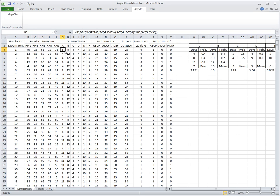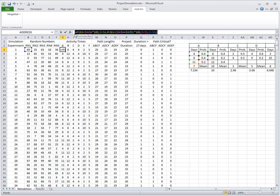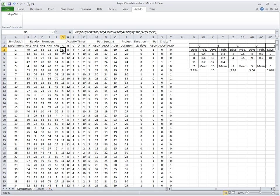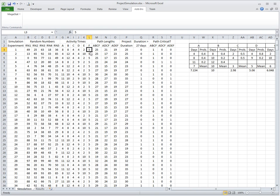Project activity times are computed through mapping. There is a certain IF function. You could also implement it with a VLOOKUP function that computes based on this random number what is the activity time for all activities up to E. F is always five days, so F is here a constant value.